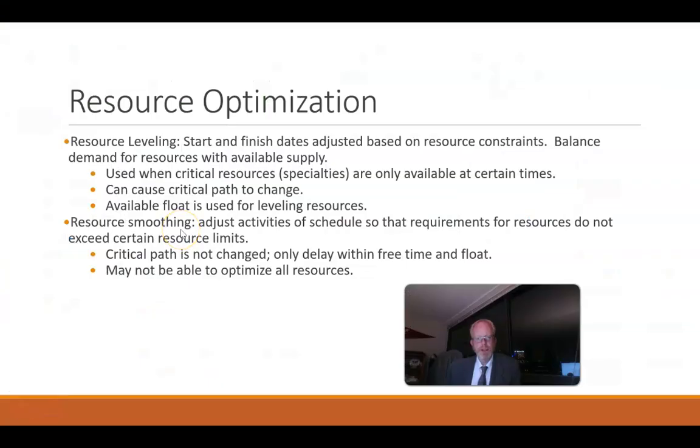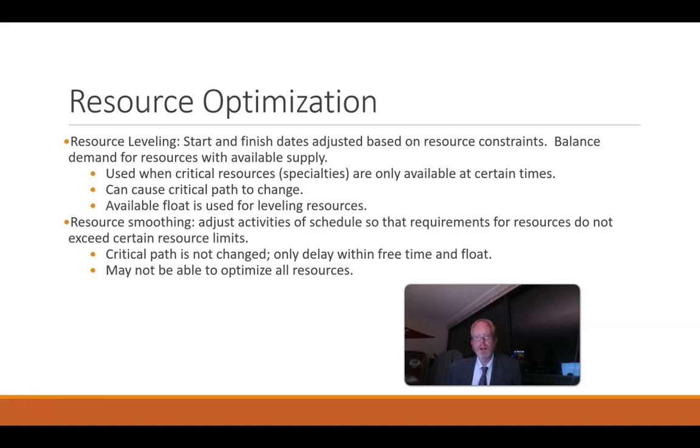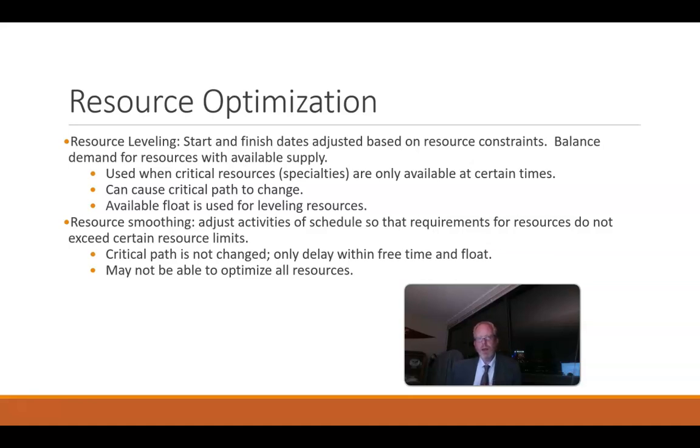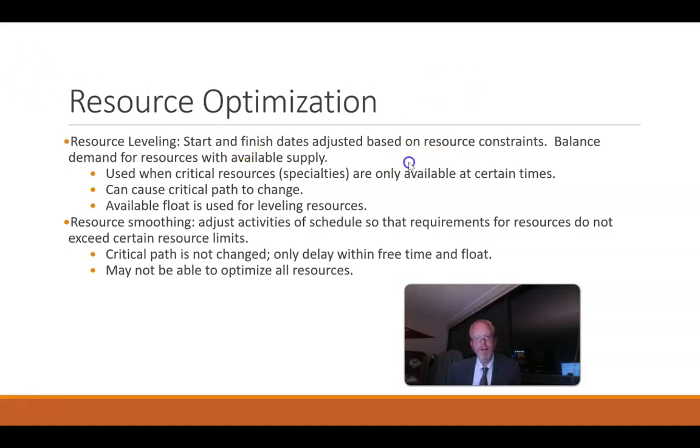But effectively there are two things we can do. One is resource leveling where we adjust the dates and allocate resources to only their working hours. Another is resource smoothing where we see how we can change things within the project maybe by changing resources or doing things in parallel and try to have minimal impact on that final date.